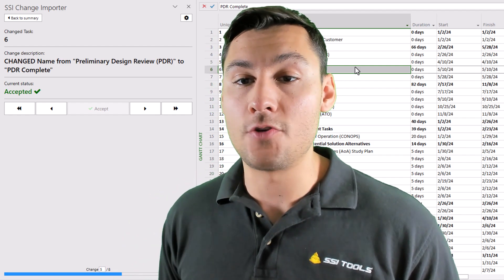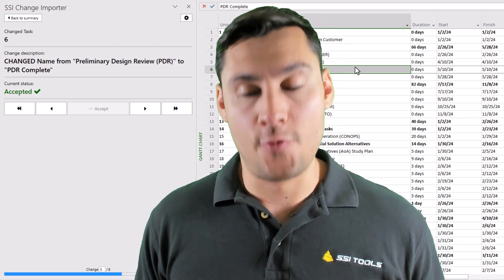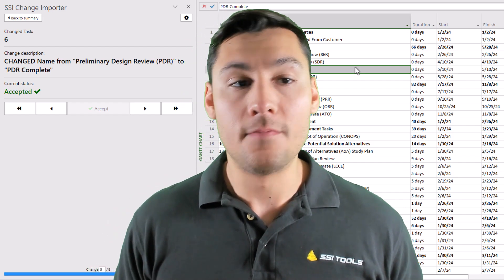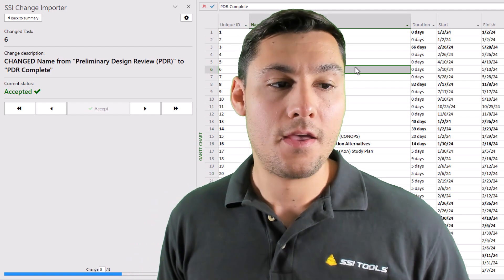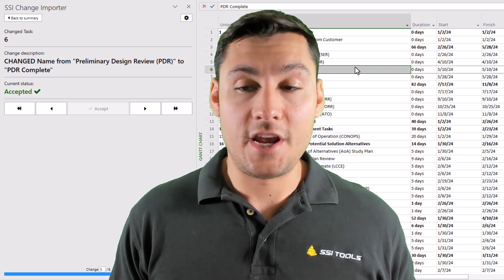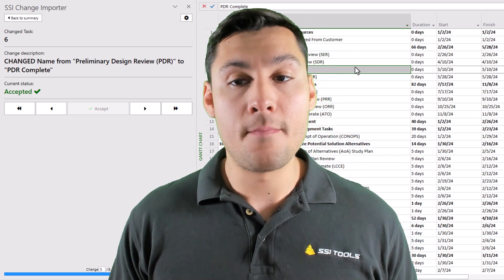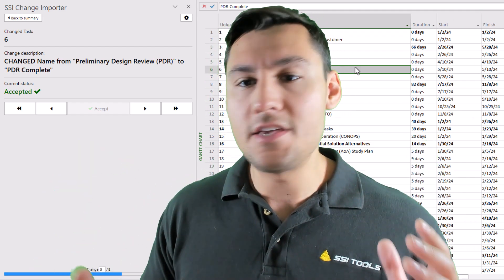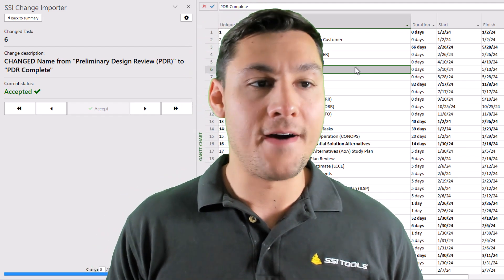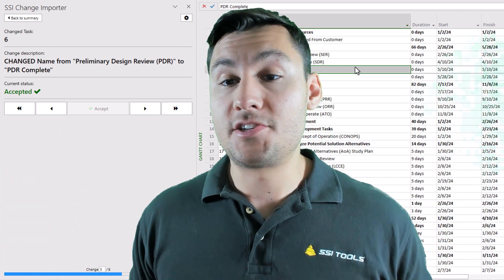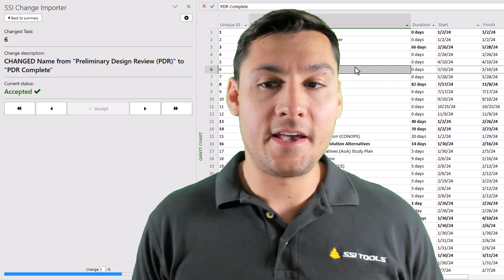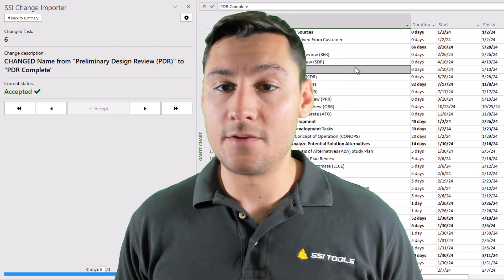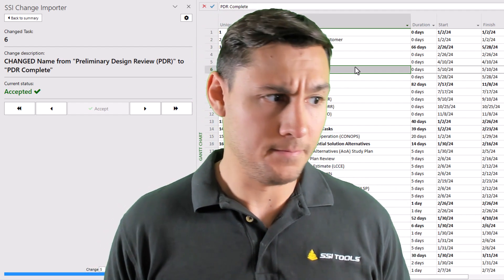And then you can distribute those copies of the file to different team members, and they can go through and they can make changes into that file and they can record those changes as they go. Then what can happen is they can take all those changes into their track change file, and those can be imported automatically into the real live master file. So essentially you can have multiple people working on the same project file all at once, and it gives the master level scheduler ultimate change control to decide what things are going to be accepted and what things will be rejected, which I think is even better than just having multiple people access a file at the same time.